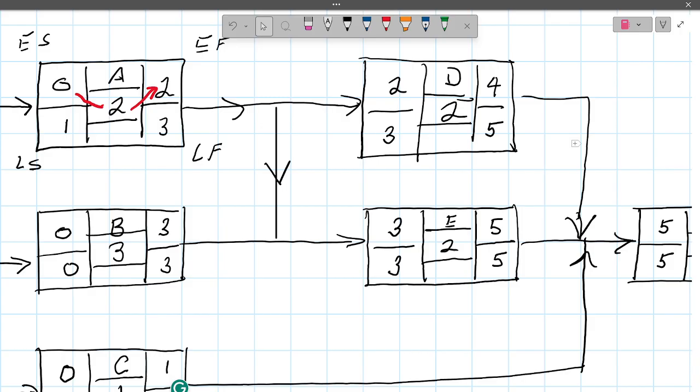So here's the cool thing. I can start A at day 0, and I have a week to get it started without affecting my schedule. Okay. B, I got to start on day 0, and the latest I can start it is day 0. Okay.